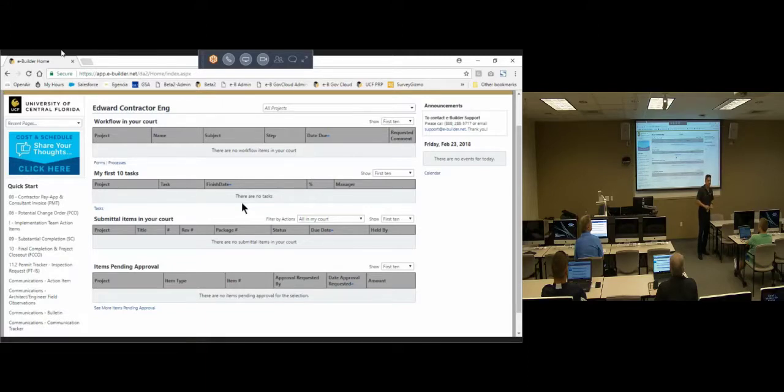Make sense? So it's up to the project manager if they're going to assign actual resources on a specific task in the system. Maybe they don't. They're managing it directly on their own, and they contact you: Hey, we need you to do this. We're at this point in time. We need you to do this type of activity. Let me know when you're done. You let him know physically with a call or email that it's done. He goes into eBuilder and updates the task as 100% complete.